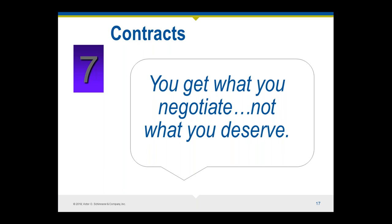Do all the proposed contracts — the owner-prime agreement, the prime-subconsultant agreement, and the owner-contractor agreement — establish clear and distinct responsibilities balanced by the authority to carry out those responsibilities? Assign responsibility to the party who's in the best position to handle that responsibility, and avoid having the same responsibility assigned to more than one party. Does the contract fairly allocate risk and reward, or is the owner trying to shift all the responsibility to other parties? Please remember that a well-drafted contract can be your best risk management tool — the first thing a claims adjuster or attorney will ask for is a copy of your contract.